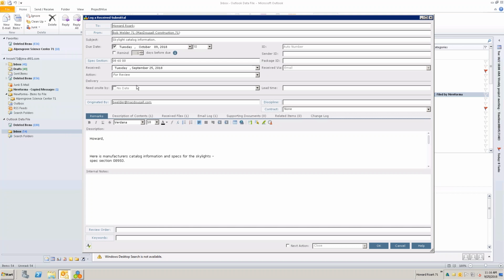So for those of you that were in the workflow consultation, have you decided how you're going to number submittals? Are you going to manually type those in, have it auto increment, or with a prefix based on spec section? Lori: Yes, I think we're going to let it auto number, but it'd be good if we can auto number with a prefix. Is that possible? We can have it auto number with a prefix based on spec section, which is why my spec section was required.